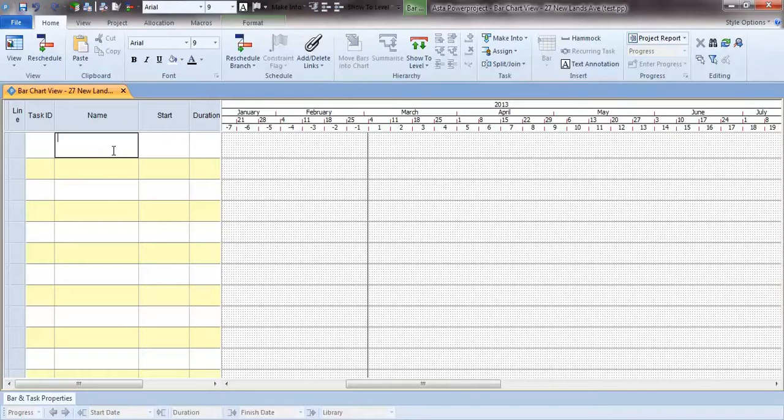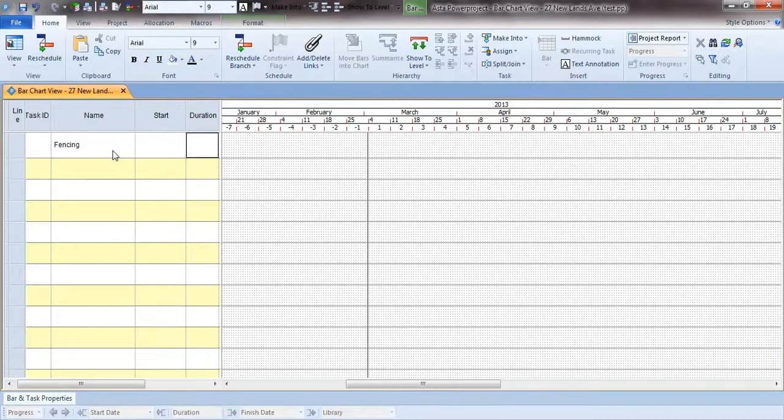The first thing that we're going to do in our project, which is a construction project for this example, is put a fencing around the site to make it secure. And I'm going to say how long it's going to take us to carry out this operation. I'm going to base this on a letter and number combination. So we type 6D for 6 days, and then it creates an activity